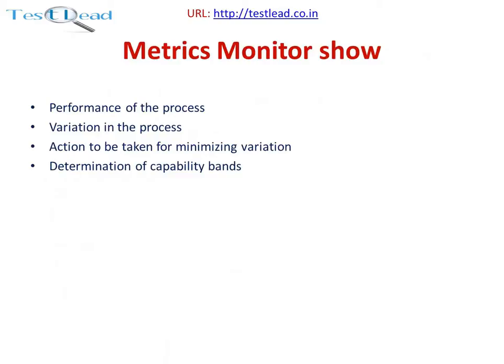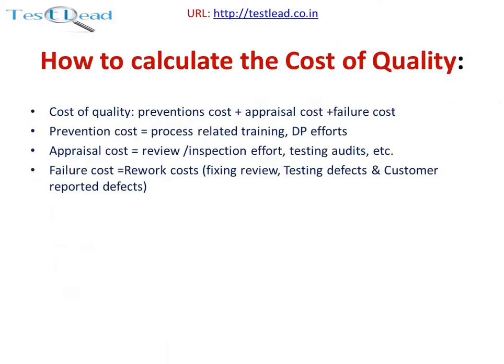How to calculate the cost of quality: cost of quality equals prevention cost plus appraisal cost plus failure cost. Prevention cost equals process-related training and development process efforts. Appraisal cost equals review, inspection, effort, testing, and audit. Failure cost includes fixing review defects, testing defects, and customer-reported defects. The cost of quality is the sum of prevention cost, appraisal cost, and failure cost.